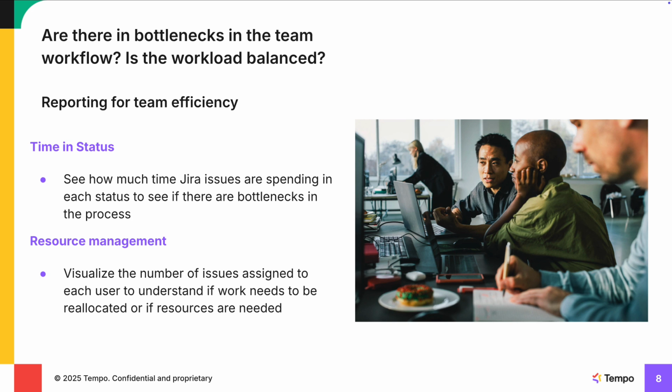The first one you can build is a report that shows time and status. This will allow you to see how much time Jira issues are spending in each status to see if there are any bottlenecks in your process.